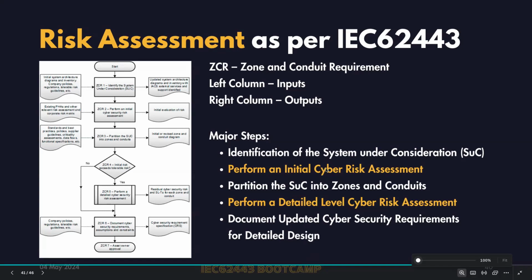2 weeks, it will go to the asset owner for approval. As a facilitator, you will note all the meeting points and the workshop points, and then you will submit the report. This risk assessment report will go as a cybersecurity requirement specification to the respective asset owner, and to the respective vendors, even OEMs, security consultants or security service providers, if there is anything to be done. Once you get the approval from the asset owner, your project closes.